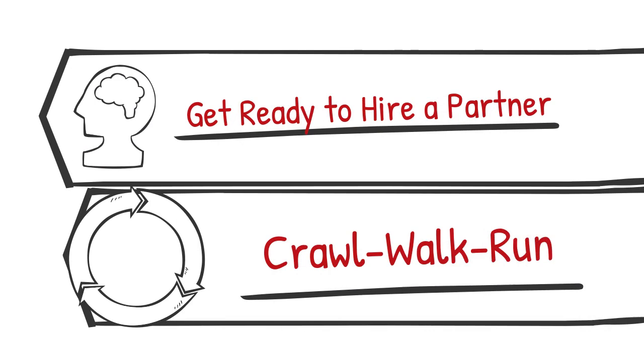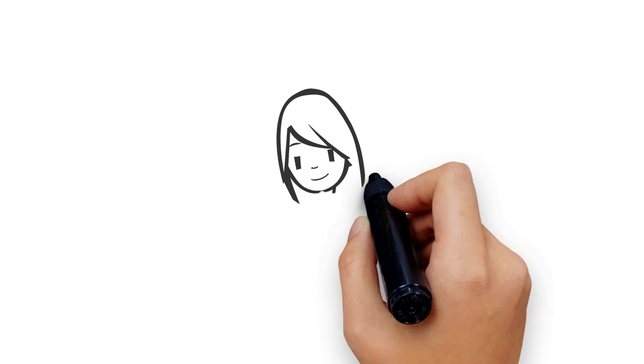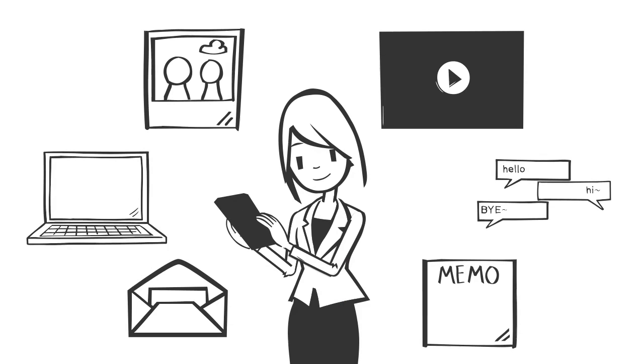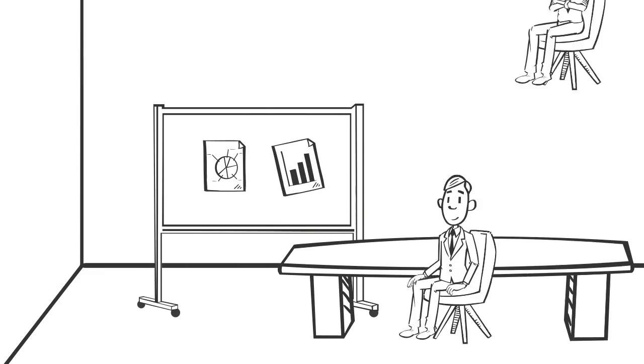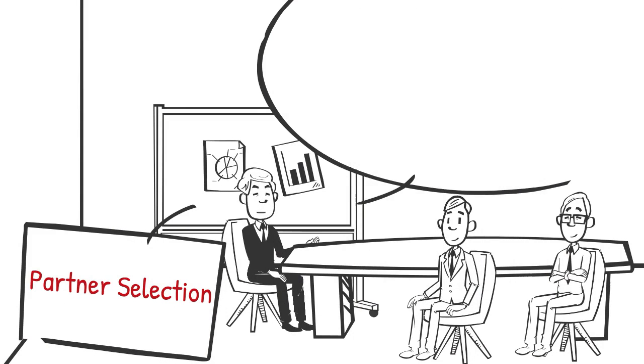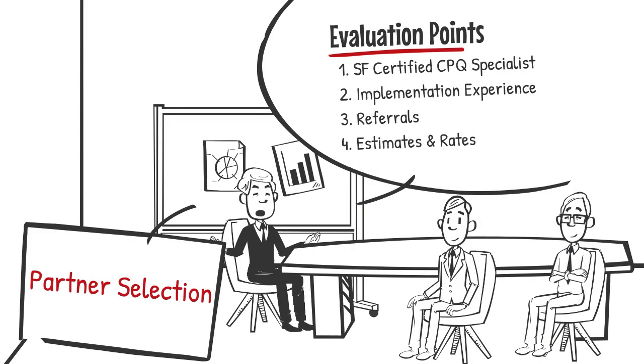Depending on your company's procurement department standards, you might be performing a formal RFP process with several moving parts and well-established milestones and timelines before a selection can be made. Primarily, you want to ensure that one or more of the consulting resources that would be allotted to your project will be a Salesforce certified CPQ specialist. You may choose to evaluate a handful of different consulting firms.